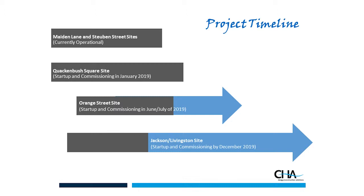Orange Street, which I know you're most concerned about, we're going to be finishing up essentially the structure installations this fall, and then we're going to button up the site for the winter and come back and make the connections in the roadway in the spring. So you're going to see a shutdown period. We're going to go in, do temporary surface restoration within the parking lot, get that operational again for CDTA, and then we'll be back probably in April, and we've got to make some cross connections going across to Orange Street.